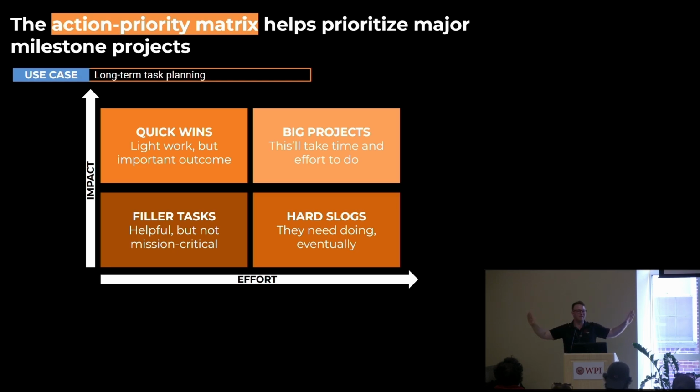An idea that we talk about a lot in my job, which has a really exciting acronym, is MECE, which is mutually exclusive, collectively exhaustive. So we take a big thing like planning an off-season event, and we break that entire thing down into, okay, I know there's going to be volunteers. I know there's going to be referees. I know there's going to be a field. I know there's going to be site logistics.